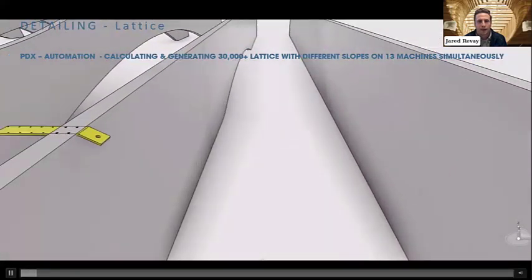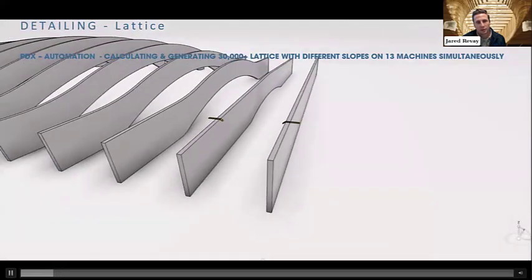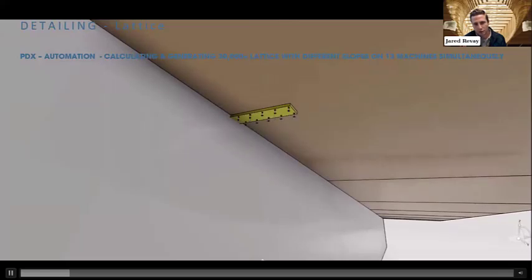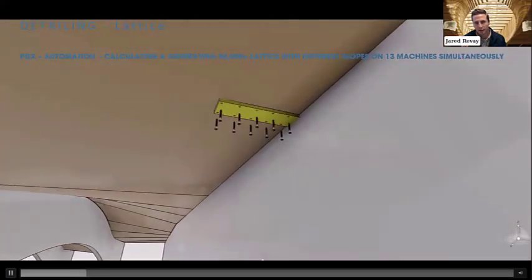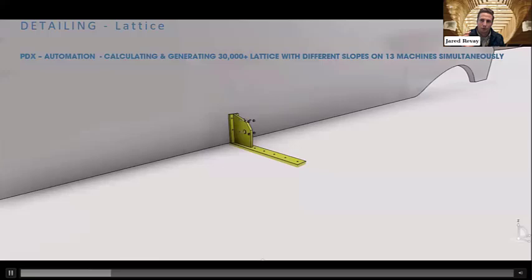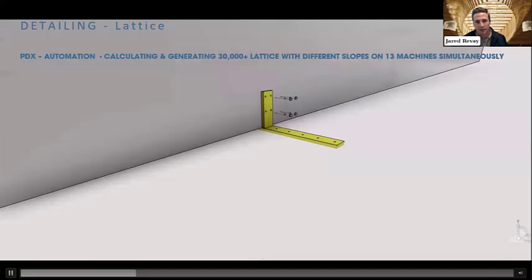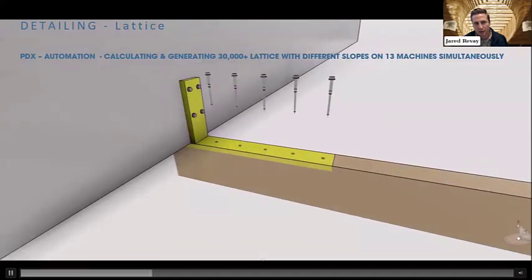Can't fast forward it. What we quickly learned was that the pieces were not typical, and by bringing this virtual video back to the design team, everyone was pretty wowed by the understanding it took to actually build this roof, and that every piece had to be individually assessed and evaluated for exactly what degree to bend the steel and what sizes to make the screws so that it all fit together structurally and aesthetically the way it was intended to. And so that meant modeling every screw, every piece, and understanding how that was going to come together.